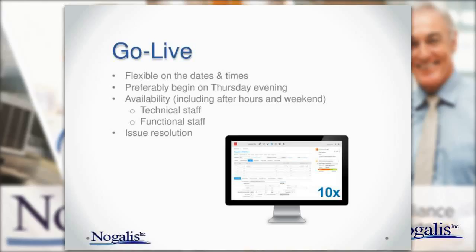John is asking how many data migration runs do we typically run through? Desi, what do you think? 3? Yeah, we normally do 3. We've done 4, but I think 4 is sometimes pushing it. If you're having issues after 3, maybe go for 4, but definitely you want to do no less than 2.